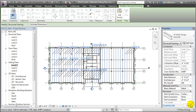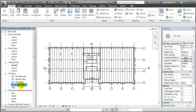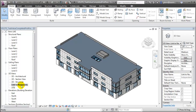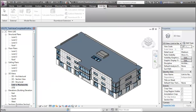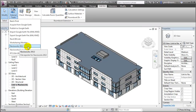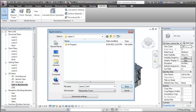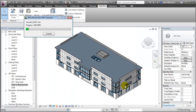By repeating these steps, you can associate Task IDs with each of the different building elements you want to include within your construction simulation. When you've completed entering those values, you're ready to export your building model to Navisworks. To do so, let's switch over to a 3D view. You'll want to use a 3D view that shows all of the building elements, because only the elements in the view you choose will be exported. To help remind yourself, you might want to create a special view named something like Link to Navisworks. To export the building model, switch to the Add-ins tab, click in the Drawing area, choose the External Tools menu, and pull down to select the Navisworks file exporter. Give your export file a convenient name, click Save, and watch as the building elements are exported to the NWC file format.